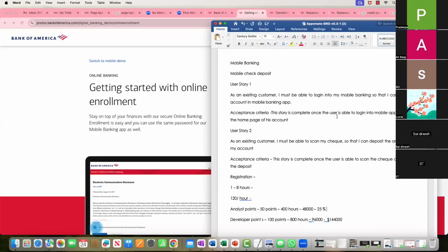You know, this will take 1 hour, give 3 hours, because you never know how you will get locked in that requirement, or what kind of issues will arise, especially defects during UAT. There will be a lot of defects, and it will take some time for you to fix them. It can take 1 day, it can take 1 week to fix a defect, depending upon the complexity of the defect.